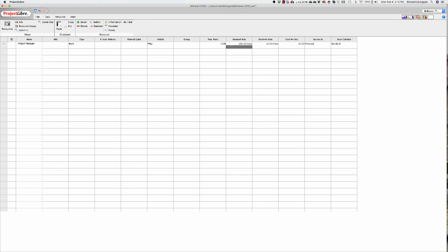So you have to calculate all those benefits, and then you use what's called a burdened rate, and you have to calculate that. That's what cost accountants do a lot of. In organizations with lots of projects, there may be a person in the accounting department who puts all these numbers together, and then when you say, okay, I'm going to need a project manager, how much does that cost per hour? And they come back with 80 per hour, and they say that's the burdened rate. Well, for a full cost of a project, you really have to know the burdened rate.